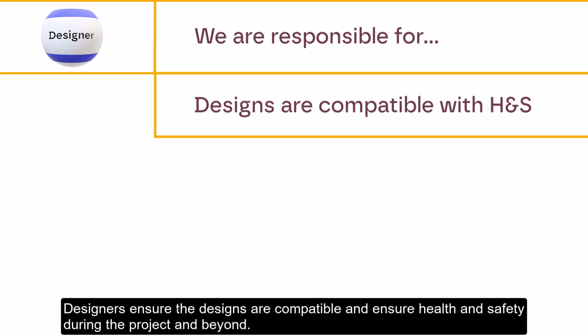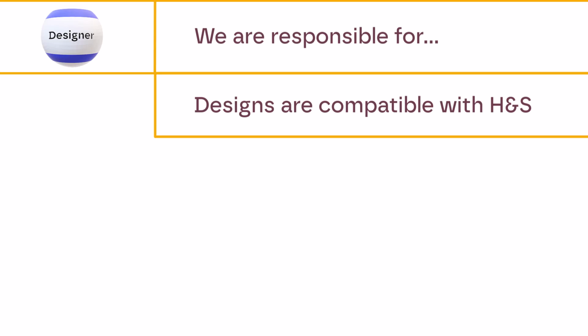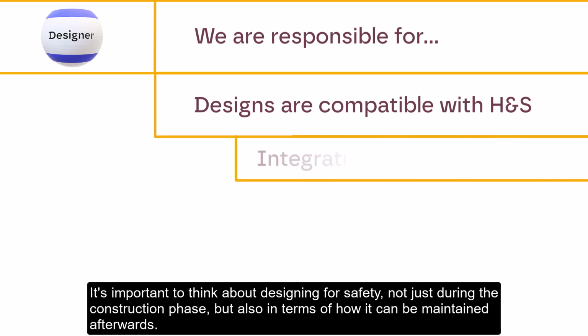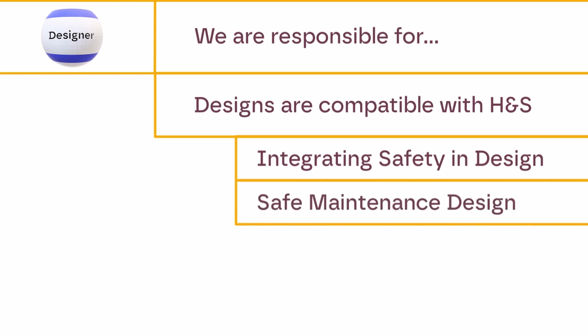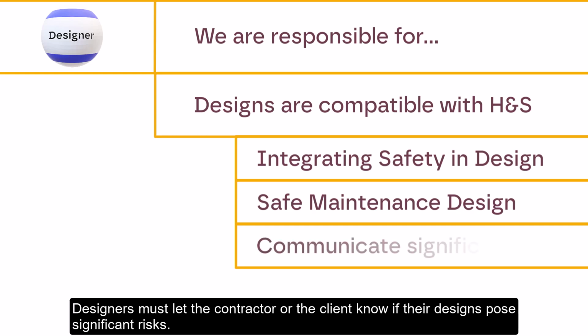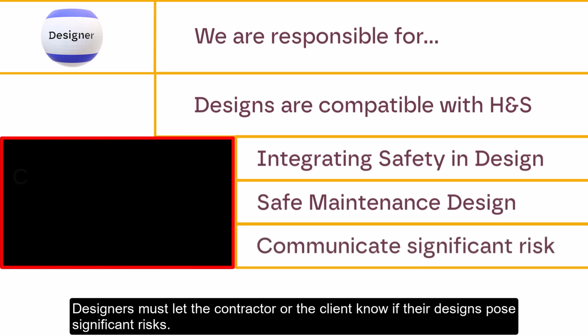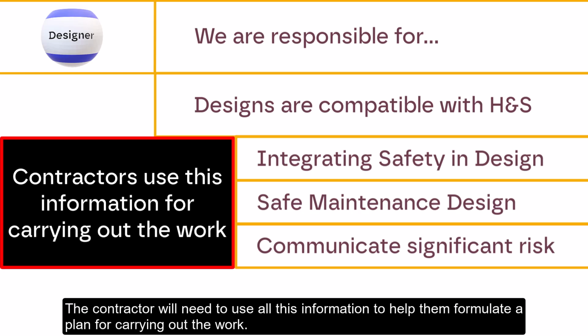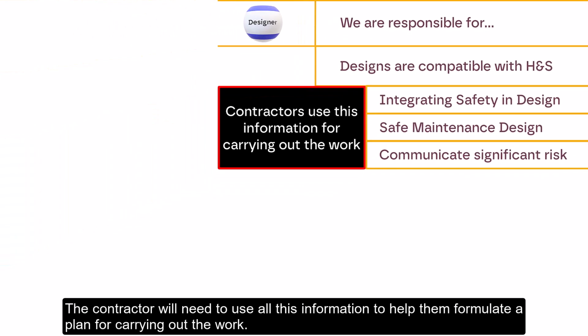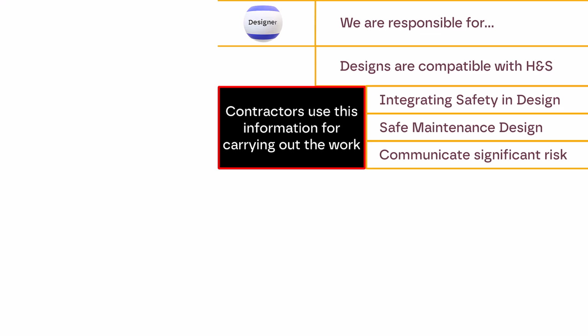Designers ensure the designs are compatible and ensure health and safety during the project and beyond. It's important to think about designing for safety, not just during the construction phase, but also in terms of how it can be maintained afterwards. Designers must let the contractor or the client know if their designs pose significant risks. The contractor will need to use all this information to help them formulate a plan for carrying out the work.